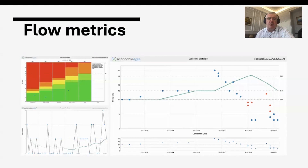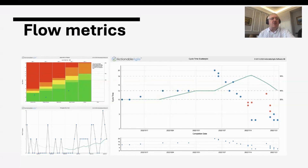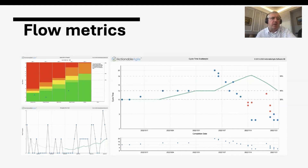In that situation, I saw a massive reduction in cycle time and throughput at least doubled — actually tripled. Average throughput went from about a third of an item per day up to one item per day, with some days delivering two or three. There are also work item aging charts on Actionable Agile — a tool showing not just how old a card is, but whether it's been in a column longer than typical. Some tools like Kanbanize let you visualize directly on the card if it's going late, bringing the analytics to the team rather than requiring them to seek it out.